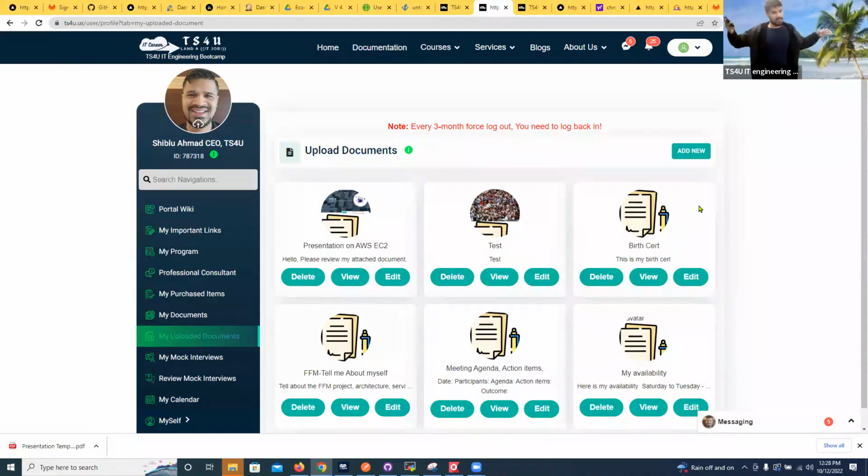So once the sprint planning is done, we start the sprint journey. Developers continue working, QA continues working. As a product owner, your responsibility is to lead the team. How? The daily stand-up call, you'll be leading that. 15 minutes, not more than that. Normally it starts at 9:30 or 10 o'clock, or 8:30. It depends on when the team starts their working hours.